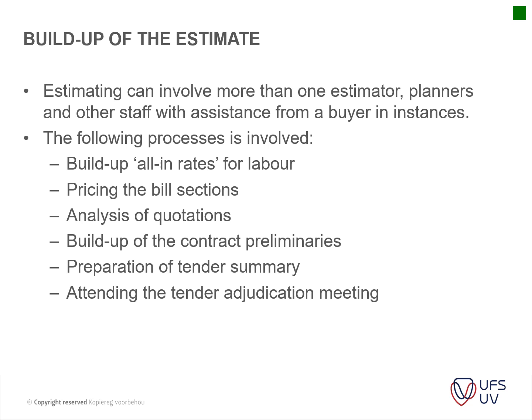Now you need to interpret that information and build up your rates for labor, pricing, and dividing the items you received into the units for the bills, analyze the quotations, build up your contract preliminaries, and prepare your tender summary, attending tender adjudication meetings, etc., to get feedback on whether you are in the ballpark with your tender or not, to learn from that.